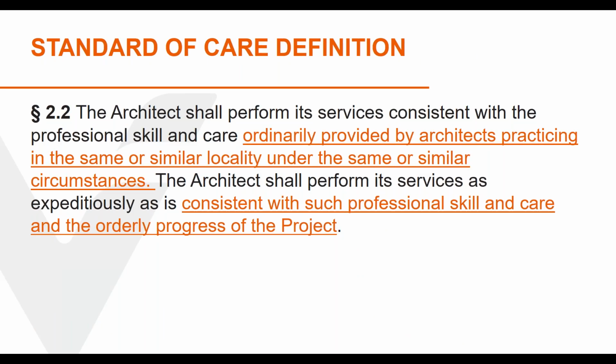This statement of the standard of care incorporates the language that every state uses as part of its jury instruction to determine if a design firm is negligent, and because of that negligence, liable to a plaintiff. In some cases, firms like to further qualify this standard of care by including language such as "and limited to" after "consistent with," or with an affirmative disclaimer of warranties, but neither is necessary. But you probably know that some clients want you to be the best or perform at the highest level, or otherwise set you up with an unmeasurable standard of care. That needs to be avoided.